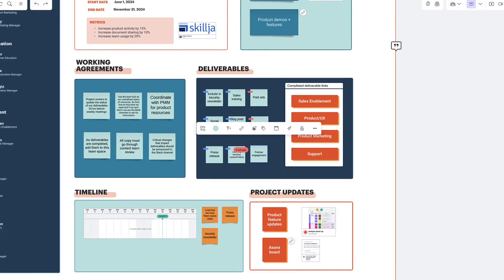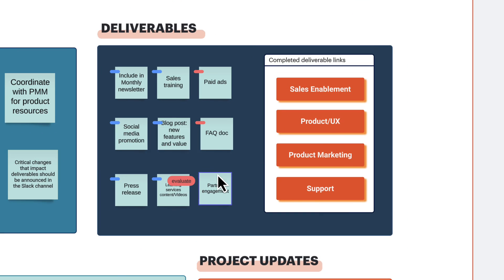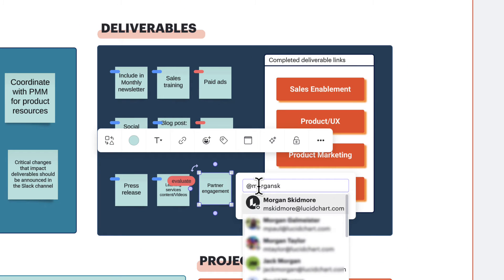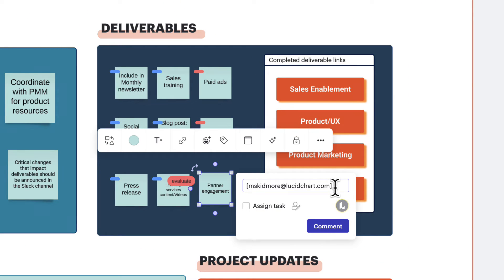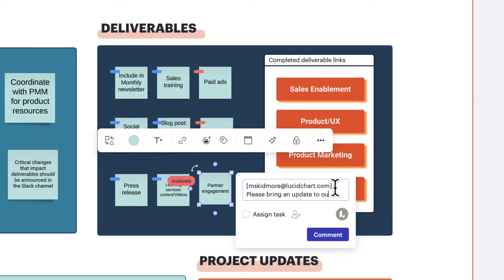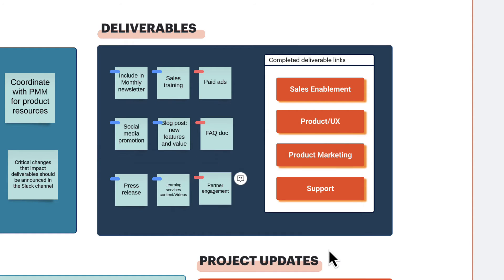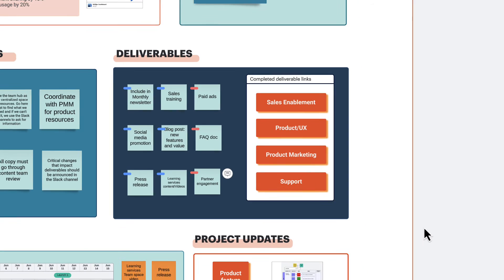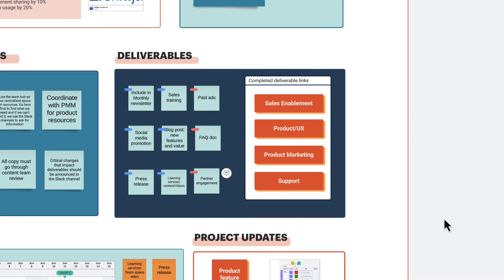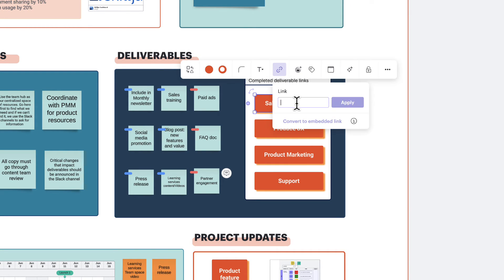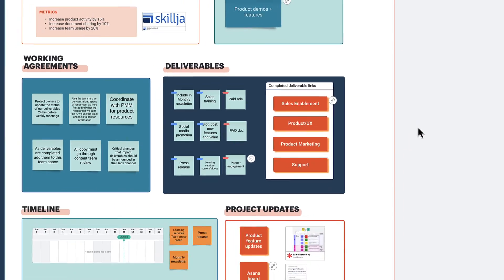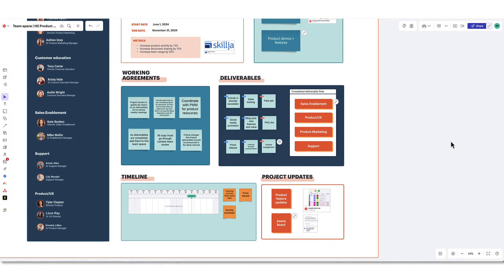For ideas that need to be evaluated, add a comment to the sticky note with an at mention for the owner to follow up in the next meeting, and click Assign Task then Assign. Sort them into categories and then pull them into the main board. As those deliverables are completed, everyone will add links to those deliverables here to make it easier for everyone to access in one place.